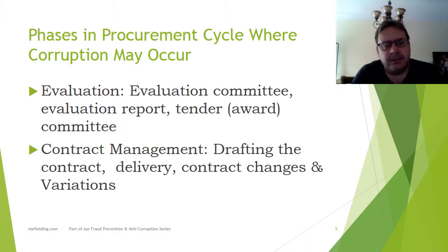Some companies bring in consultants, so if you have a really big procurement, bridges or something, you want to make sure you've got an architect, a civil engineer, someone who knows something about construction, and probably just a member of the public as well, to add a little bit of common sense to it. So we get this idea of the evaluation committee being independent, and also, I guess, the idea almost of segregation of duties, so you have enough people to ensure that you've got some independence there.